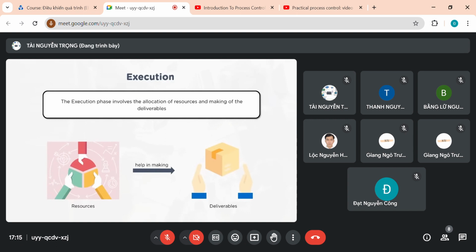Third is cost. As we know, to do any project, it is very essential to ensure the project happens within that budget. So project cost is estimated initially, then that estimated cost is checked to see whether the assumptions and considerations are right or wrong. Is that much monetary resource really required for the project? Then after understanding the justification and obtaining clarity, the budget, the monetary resources, are allocated, confirmed and approved. Then it becomes a budget. That will be a cost baseline.